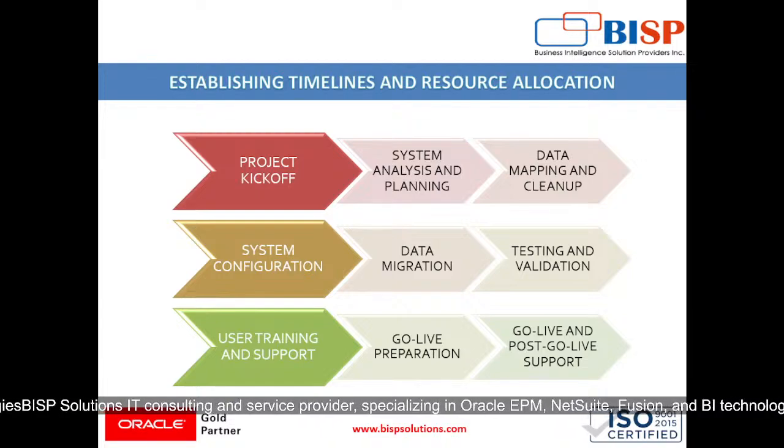Then testing and validation, it will take around 10 to 11 weeks for conducting system testing for functionality and data integrity and performing user acceptance testing. Then comes our user training and support, which trains users on NetSuite workflows, reports and dashboards, which will take 12 weeks time, where we will be providing user manuals and conducting Q&A sessions if there are any questions of the employees.